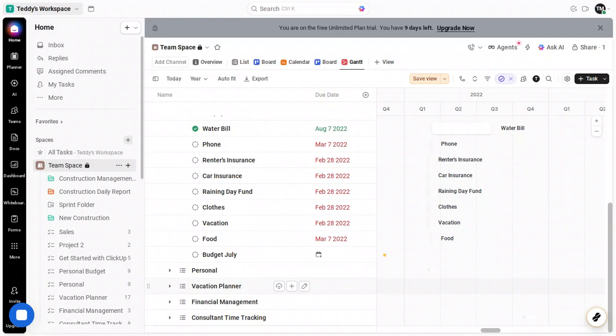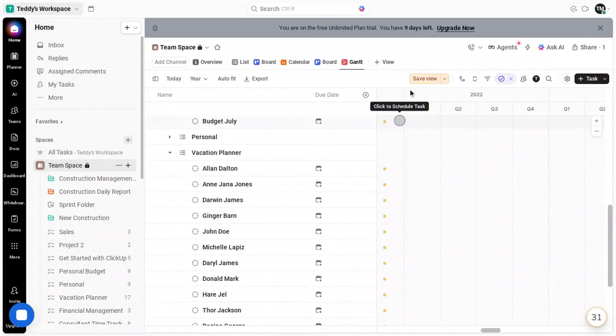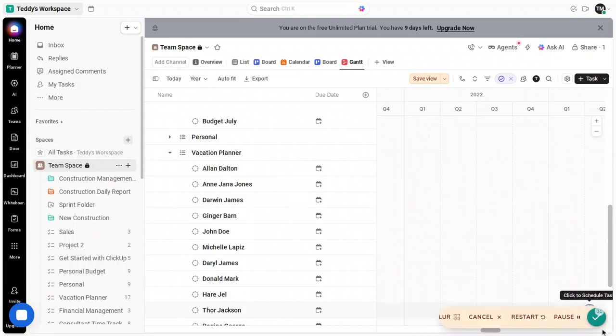Completed tasks stand apart from those in progress or not started. If you're planning daily work and want to make urgent or high priority items jump out, color by priority is a smart pick, especially if you took time earlier to set priorities like urgent, high, or normal. If you're organizing a multi-project space and want different streams to be obviously separate, color by list provides that clarity instantly. And if you just prefer a clean, uniform look while you set up details, default keeps everything consistent until you're ready to switch. Highlights add another